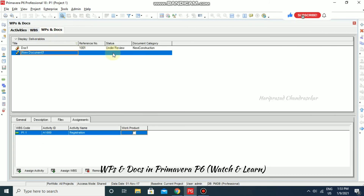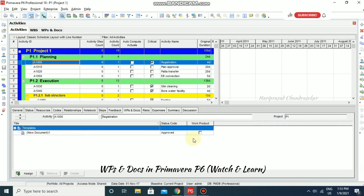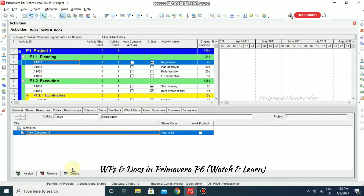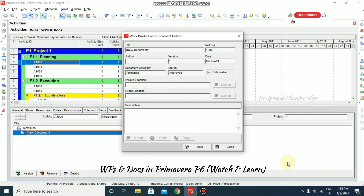You can specify the category for a document — for example, 'Templates' — and set its status as Approved, with reference number 1002. Once you go back to Activities, you will see the same document linked there. You can view the details from the activity as well. This is how you add work products and documents to your project, which will be useful for clients to review all documents linked to the project.